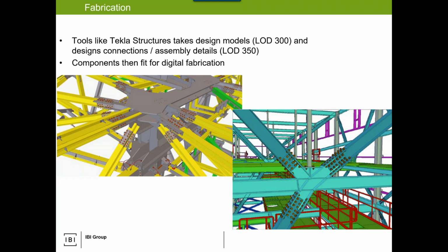But oftentimes I want to make sure, oftentimes BIM coordinators don't understand why engineers or architects are just, no, we won't do that. So legal, we'll talk about that, but this is not what a structural design engineer will engineer. It just won't do that. They'll look at load analysis, but they won't engineer the connection. I do my design model, it goes to the fabricator, they engineer and seal what you're seeing over here.